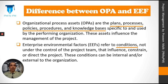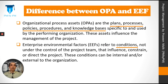What's the difference between OPA and EEF? Any kind of plan, process, policies, etc. can be categorized as OPA. Any documentation that is helpful for the project team can be construed as OPA, whereas conditions which are not under the control of the project team can be construed as EEF. Now there's a catch here — you might say that you do not have control over some documents like guidelines, but they are considered as OPAs. Why? You might not have control over the guidelines, but you certainly have control over your project. You can tailor those guidelines to suit your projects — that is why one of the OPAs is tailoring guidelines. But on the other hand, you do not have any influence over the culture of the organization, the social structure, legal matters, or government policies. So they are construed as EEF.